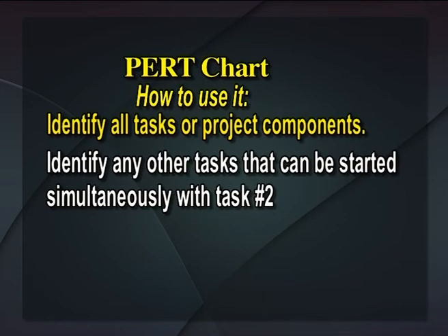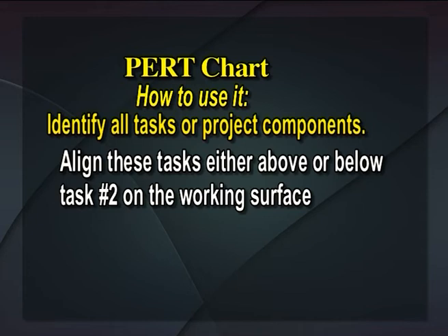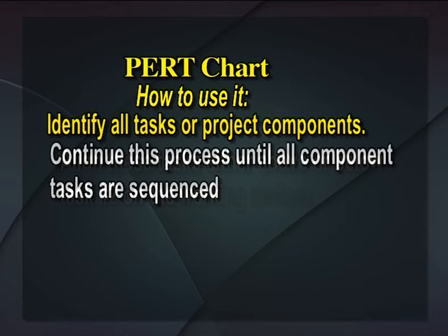Identify any other tasks that can be started simultaneously with task 2. Align these tasks either above or below task 2 on the working surface. Continue this process until all component tasks are sequenced.